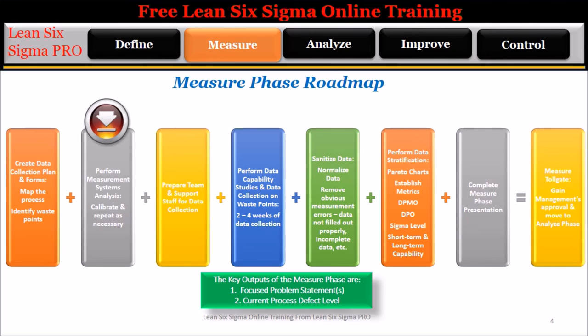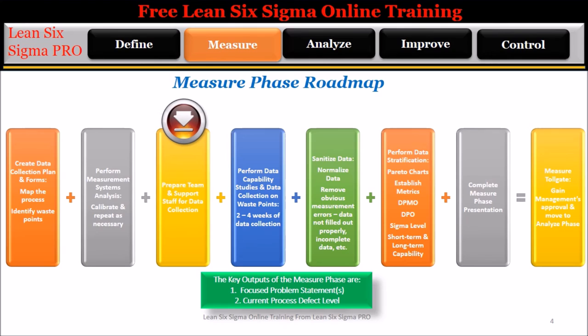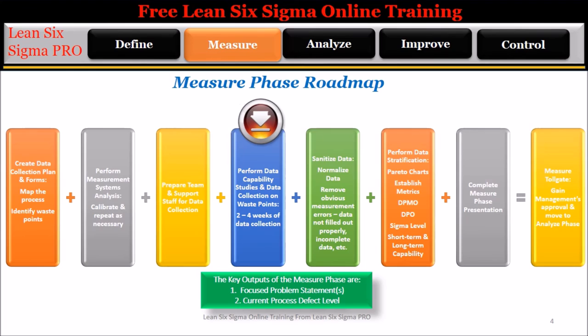Step 3: Prepare team and support staff for data collection. Support staff are those people who are not a part of the project team but who will play a vital role during the data collection process of the measure phase. Step 4: Perform data capability studies and data collection on waste points at the gemba. Data collection typically lasts 2 to 4 weeks in total duration.